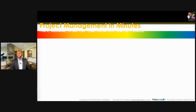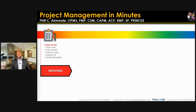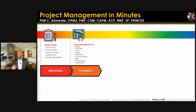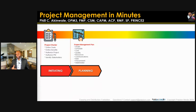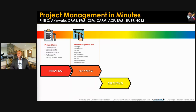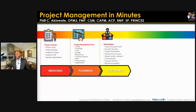The first process group is initiating, where we develop a project charter and identify our stakeholders. Second is planning — we plan everything: scope, schedule, cost, quality, resources, communications, risk, procurement, and stakeholder management. Then we have executing, where you carry out the work, execute the plan, and create deliverables.